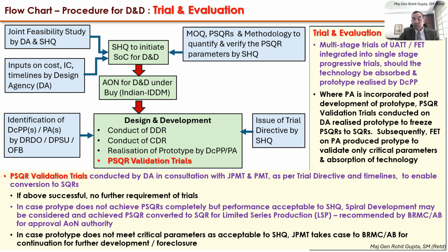However, when the production agency is incorporated into the complete procedure post the development of the prototype, the production agency may not be able to produce the equipment as per the prototype developed. Therefore, the PSQR validation trials are conducted on the prototype developed by the DA, the development agency concerned.